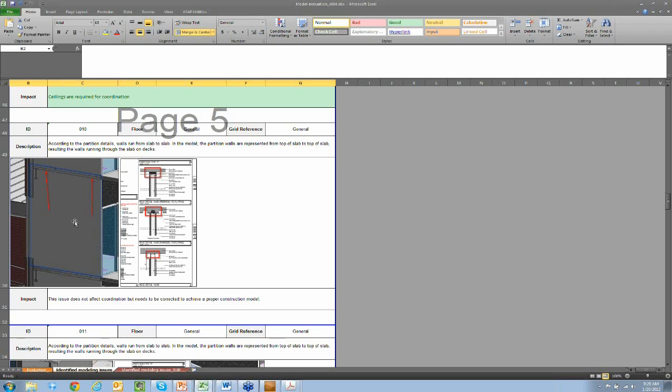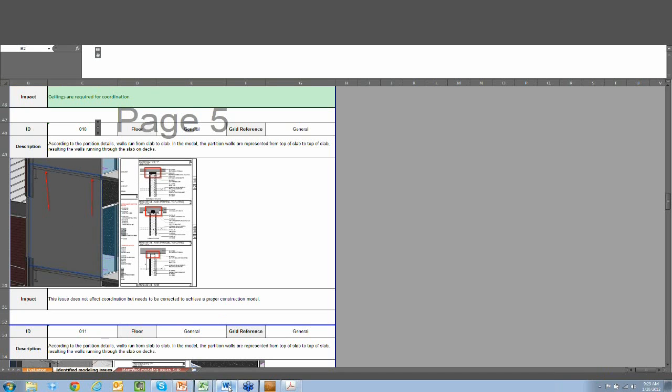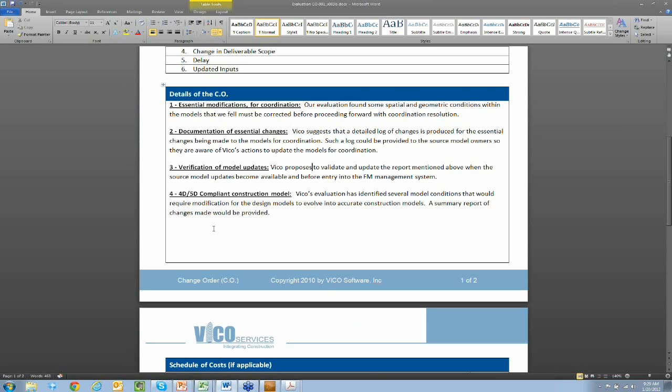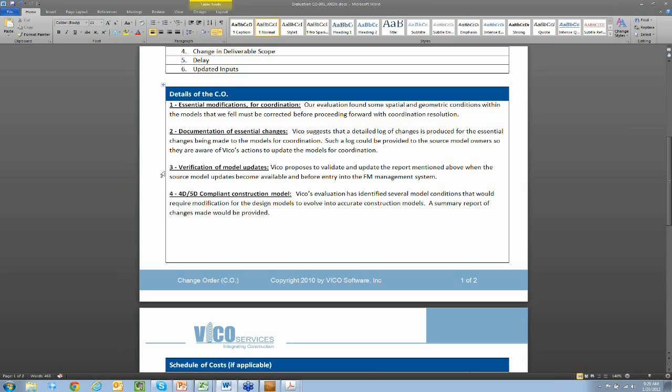So after doing this model evaluation service, we're able to give the clients a couple of options on what they can do with their design team models. And that's what I have right here. This is a typical change order, as we call it. From the very beginning when we contract the process, after we do the model evaluation, we'll provide a change order that shows you everything we've found along with the diagrams that I just showed you and make some suggestions about what may need to be done.